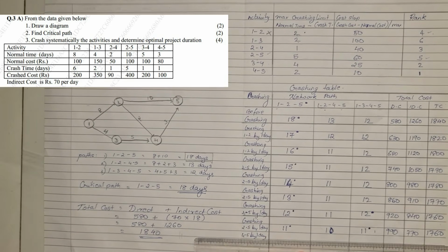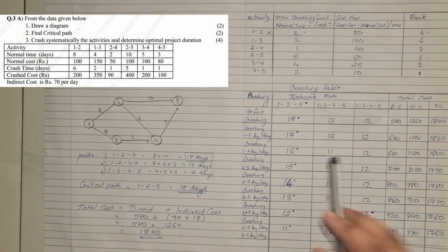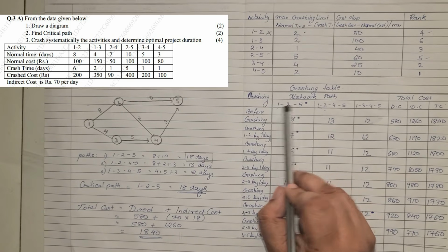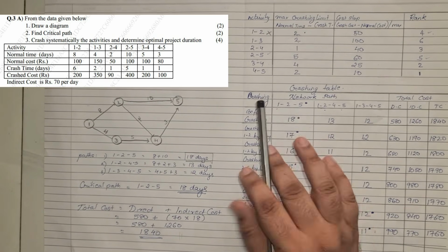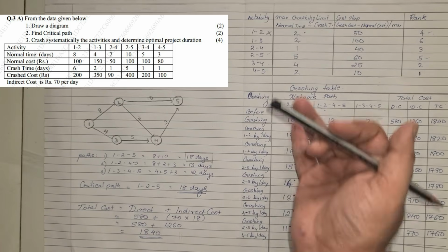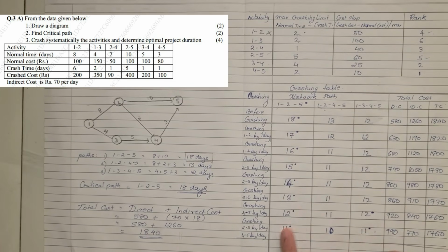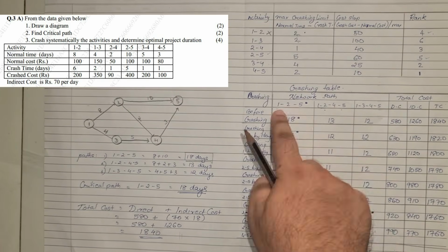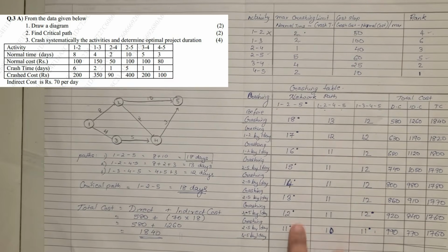So now the moment it becomes constant, you know that the next step will be much more. Okay, now if you look carefully, we are done with our crashing. 1, 2 and 2, 5, both these values have been over. So now I cannot go because main is our critical part. Now critical part cannot be solved further because we have crashed both. 1, 2 and 2, 5 both have been crashed. So this is it. This is the final answer.